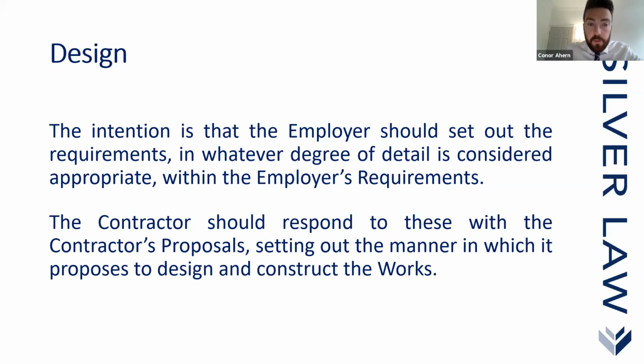So from the outset, the intention is that the employer should set out the requirements in whatever degree of detail is considered appropriate within the employer's requirements. The contractor should respond to these with the contractor's proposals, setting out the manner in which it proposes to design and construct the works. So, relatively straightforward, but the key defined terms to look out for here are the employer's requirements and the contractor's proposals.